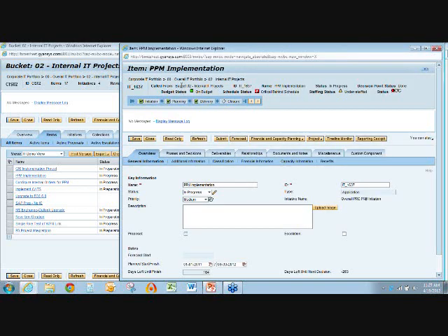So here on the top we have what's called our quick information. It always shows you where you're at, the overall portfolio, and I'm in that child or sub-portfolio of internal IT projects. I have initiation, planning, delivery, closure, just a standard phase methodology here. You can customize this through configuration very quickly to have whatever you need for a support or maintenance break-fix type project or portfolio, sub-portfolio.